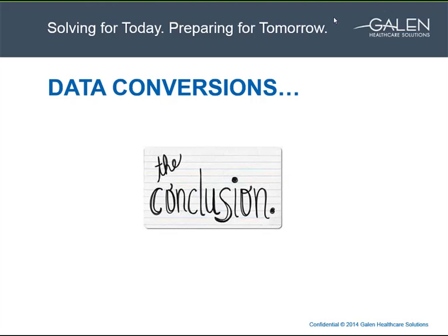Thanks, Bruce. I don't know, Erin, if you have any kind of guide. I think really what happens with the large-scale testing is looking at the total population of patients, the total number of data elements coming over, and then coming up with a subset of that. It's a discussion, and I know that a certain percent, like 25% sometimes, but let me say this, it can take an awful long time to validate even just one patient, so you have to balance how much time and how many resources you have available to do the testing. So I just think it's hard to answer that in one pat way.